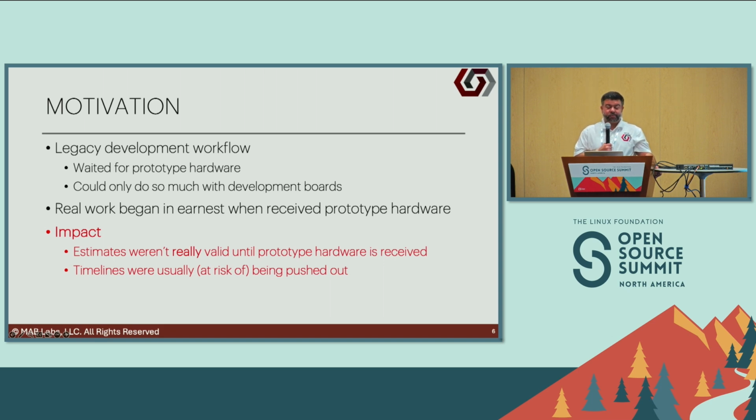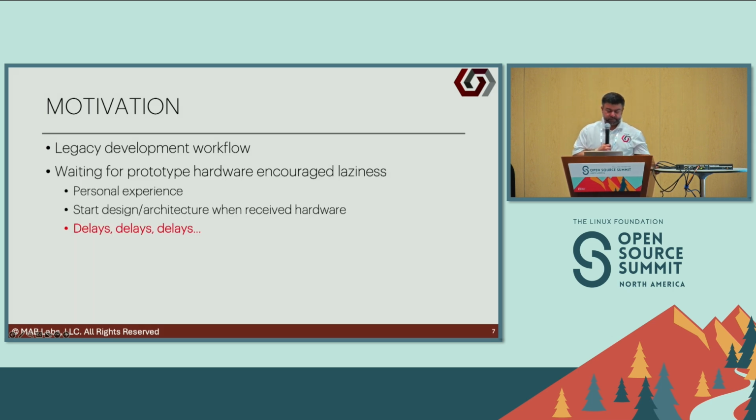And what happens is, well, you can't estimate what your tasks are really going to take, right? And so what ends up happening is, okay, the last sprint of the project timeline is once you receive the hardware, well, now you have 2 weeks to get the project done, writing the firmware, getting it tested, making sure everything works. And what usually happens is timelines get pushed, people get upset. So, that's the typical development workflow.